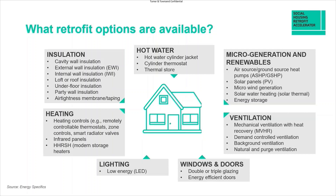So what retrofit options are available? Retrofits can involve some or all of these measures, depending on the project budget and baseline energy performance. Measures such as external wall insulation, for example, are relatively high risk and are deemed as structural work. This work will also require consent from the local council's building control team or even planning, depending on the location or significance of the building. When identifying any of these measures, it is important to consider the value in terms of payback and carbon cost effectiveness to determine what the impact will look like.